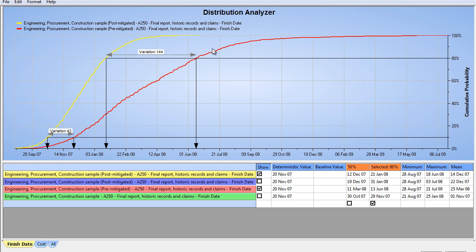We're going to step back maybe 10, 20 times. But how you present this is critical. I do present the worst case usually, so I know people know it exists. Then I can show them how I fixed it. I wouldn't show them every step backwards because it's too much information, but I could say, hey, we did all these steps and we were able to save 144 days. That 144 days cost us $4 million. We think that's an estimated savings of $6.5 million. Will you accept those mitigation steps because it will save you $6.5 million? Generally, it's a no-brainer at that point.